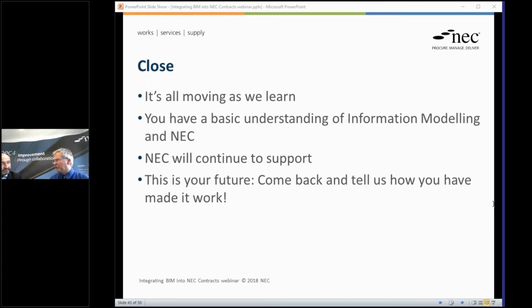Yeah, I can see the usual debate between bidder and client. The bidder's always going to want due skill and care. X15, I don't think is in the DBO contract, but it wouldn't be rocket science to steal it from the ECC and put it in the DBO, should you wish to. But it does then create that issue of trying to split out, is the fault design or construction? There's a court case from Scotland not so long ago which had exactly that as part of the debate. And also bear in mind again, the contracts are designed for use on an international basis, and in other jurisdictions, fitness for purpose seems to be more readily acceptable to the supply chain, rightly or wrongly.